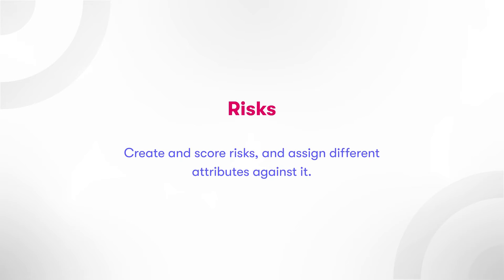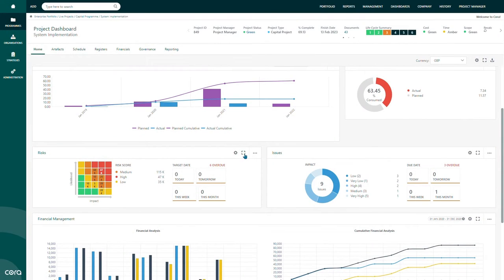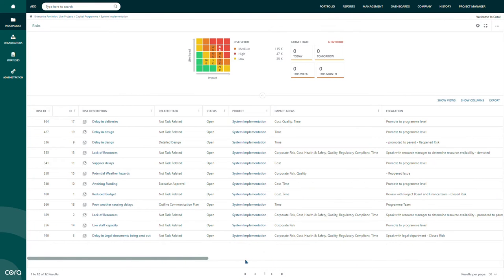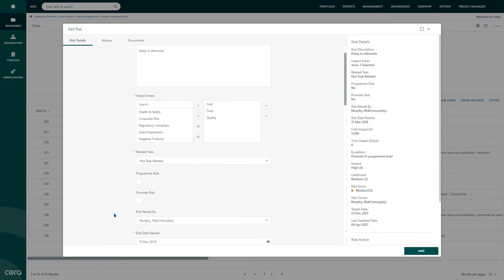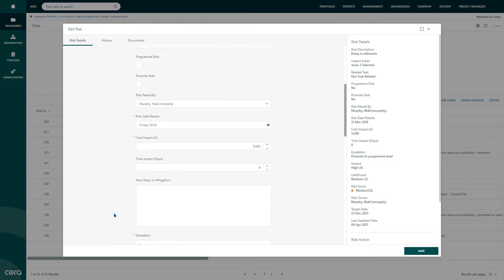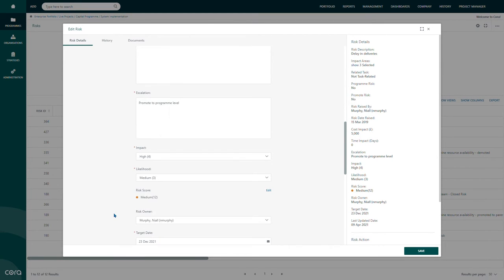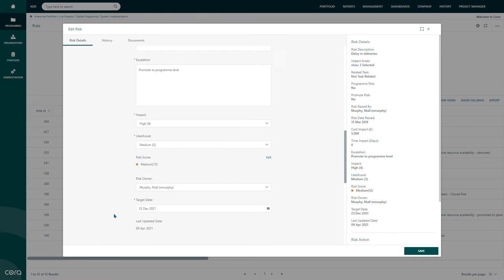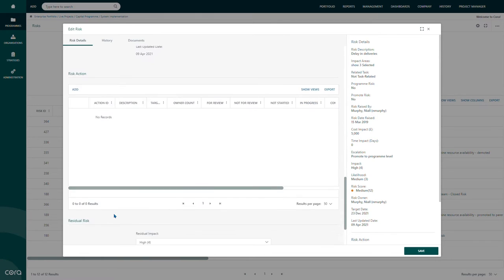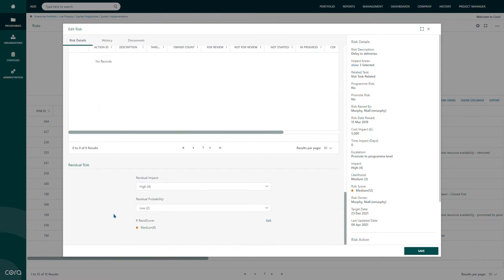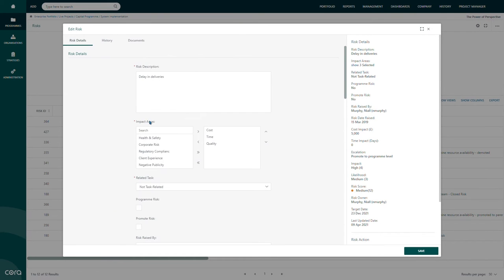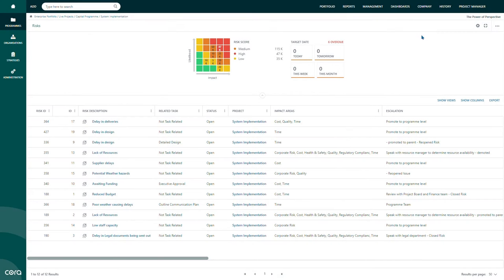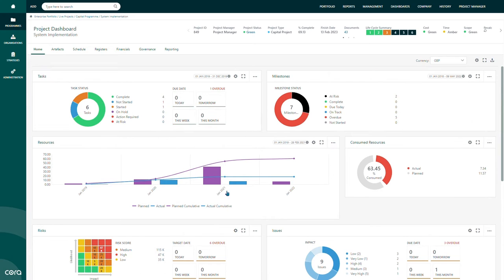Risks. Using the risk module, users can create a risk and assign different attributes against it. Each risk is scored based on its likelihood and impact, then captured on a risk matrix. And each risk is assigned to individual owners with a target date. Additionally, risks can capture cost and schedule impact and can be linked to change, schedule, or action. It can also be promoted across the program structure.